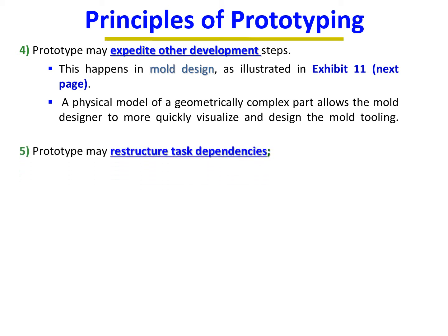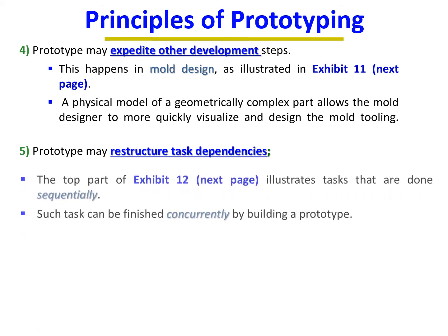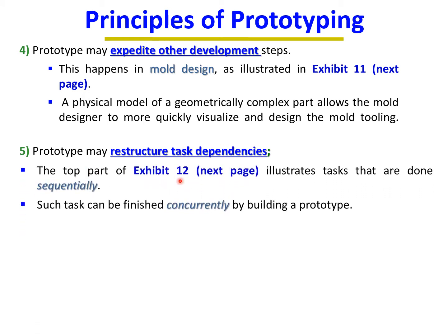Principle five: a prototype may restructure task dependencies. The top part of exhibit 12 illustrates tasks done sequentially, one after the other. By building a prototype, such tasks can instead be completed concurrently — in parallel. Sequential tasks might take one full day each, but if run in parallel, both can begin from day one, reducing overall time.